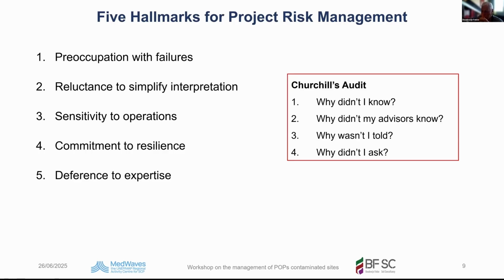If things go wrong, have fallback scenarios, have extra time, have extra money, have staff available, have your emergency kits, have fire extinguishing materials. When things go wrong, you should be able to act. And 5, deference to expertise. The expert should have the final decision on technical things. So not the administrator, not the project manager, but the expert should direct when things go wrong.